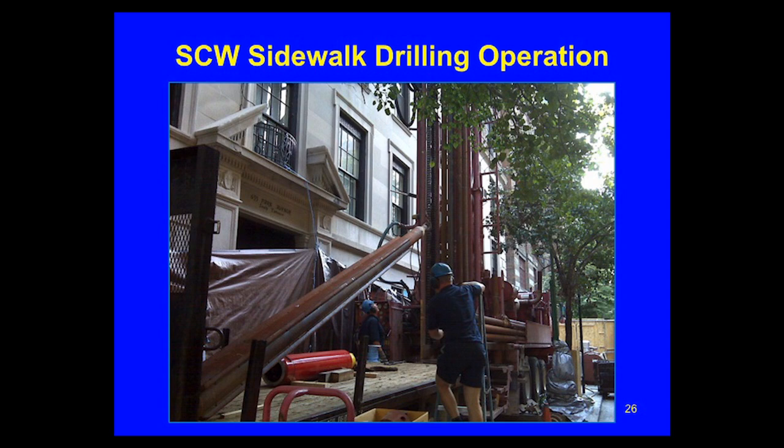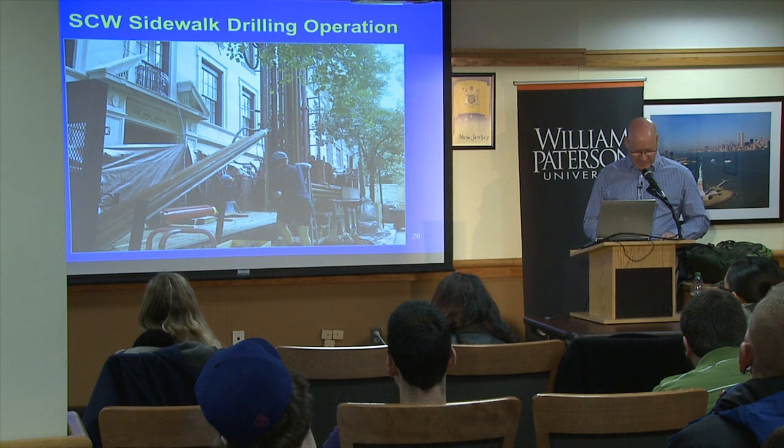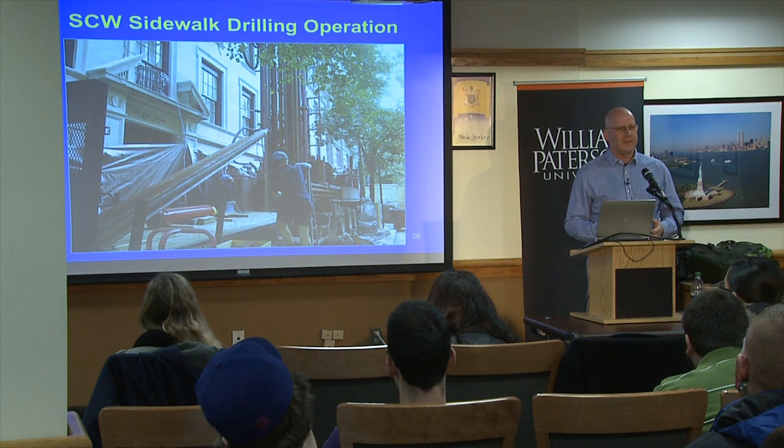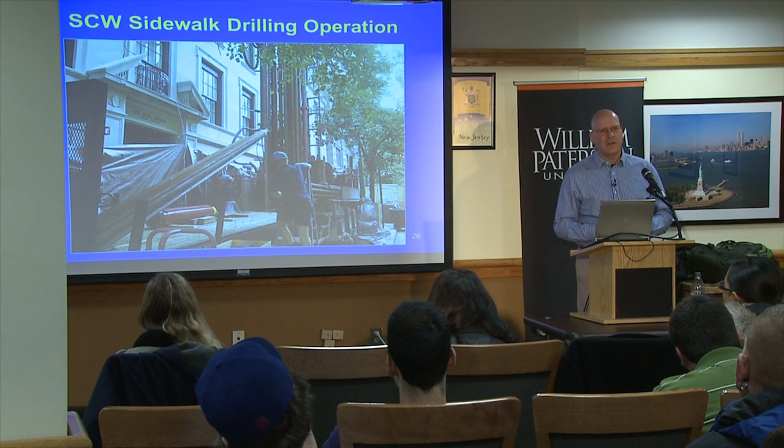There are rules and regulations that do not allow someone to change the facade of a building in New York City. So you have an owner who purchased a very expensive duplex apartment in a building that has historical significance, and that owner cannot just put an air conditioning system in the window, okay? That wouldn't fly. They can't put anything on the roof. They cannot change the facade at all.